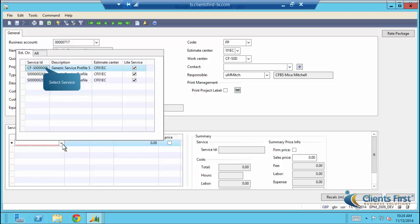We'll cover services profiles in a different section. However, for each service you enter, line items associated with that service template will automatically be added to the project. This is something that you would otherwise have to enter manually, but the EPM module allows you to do this automatically.